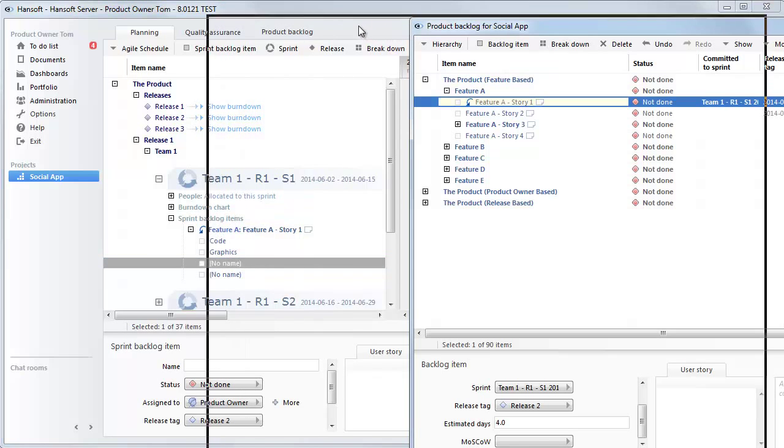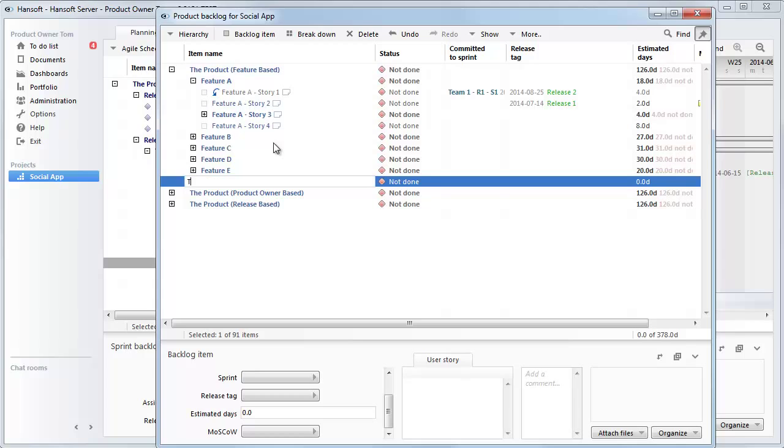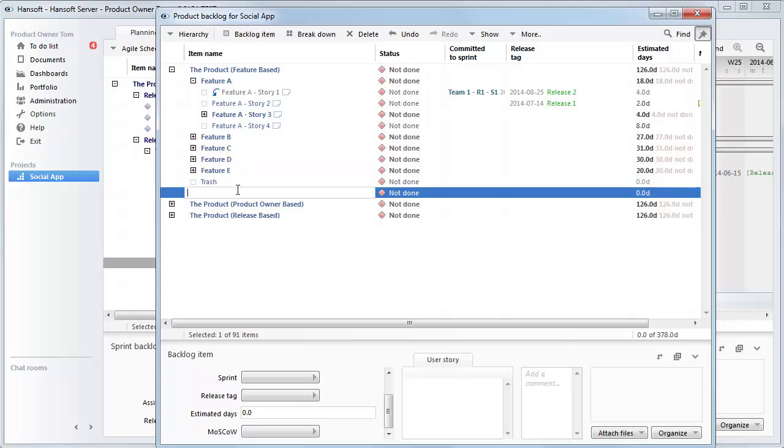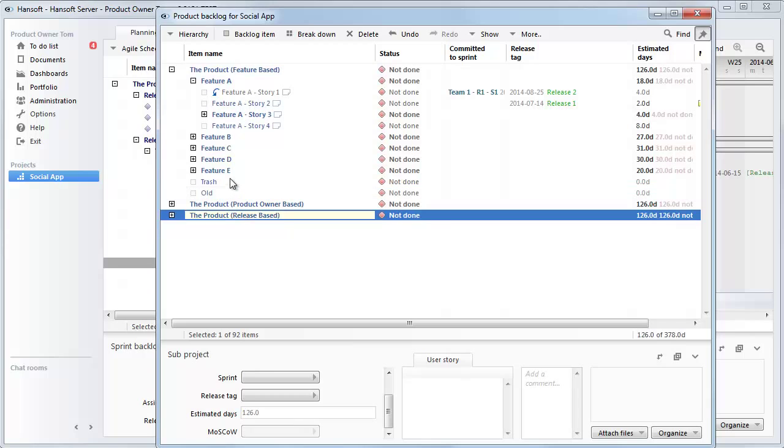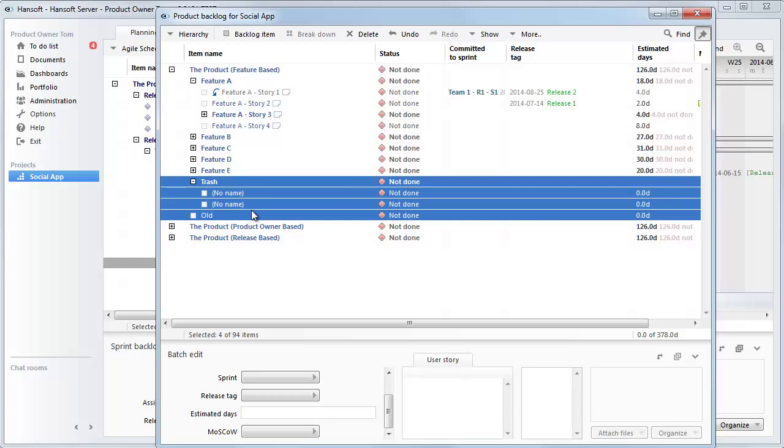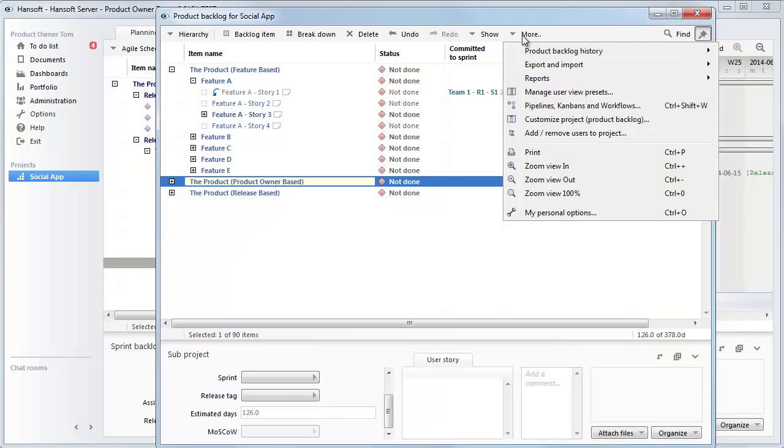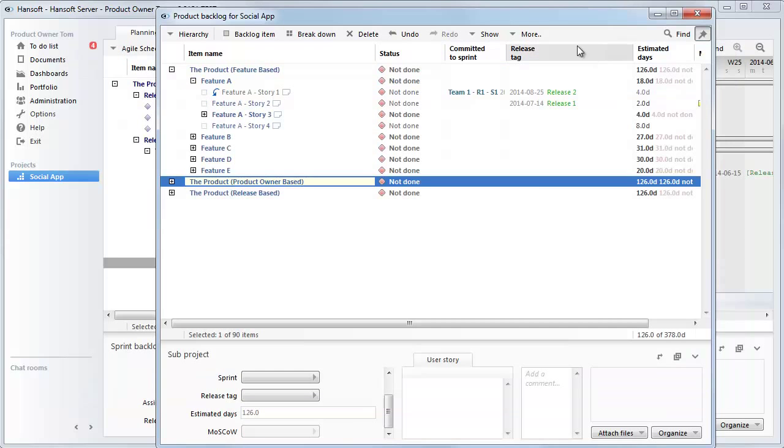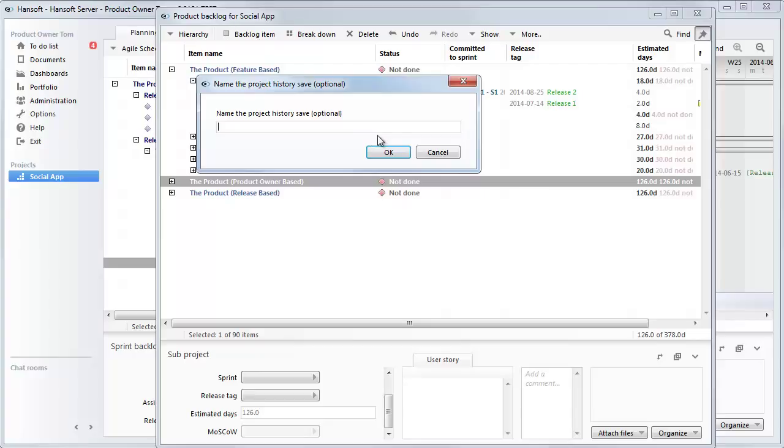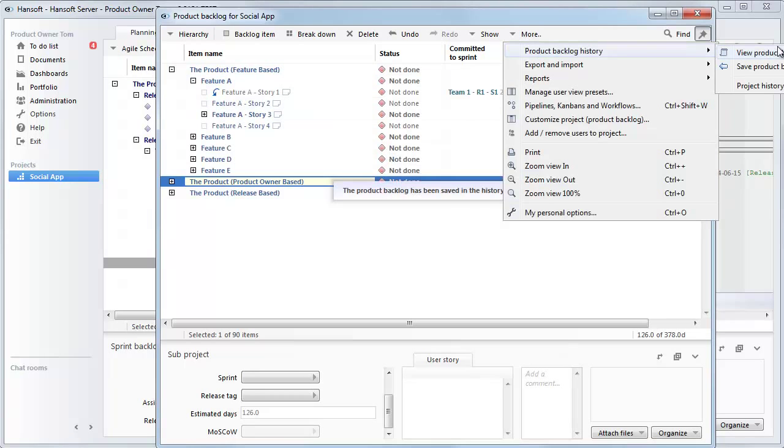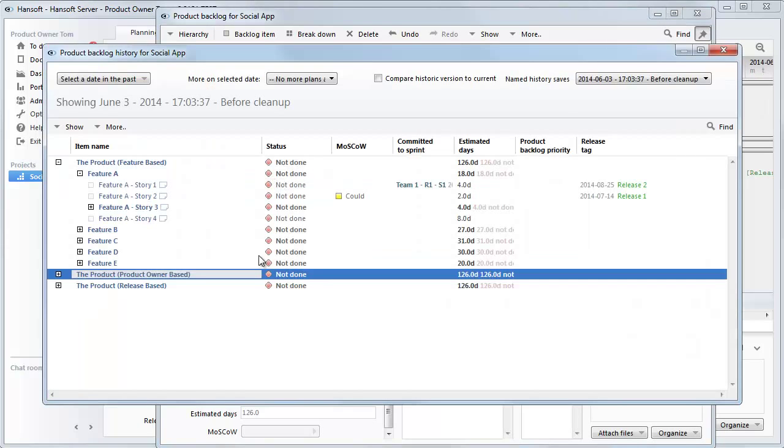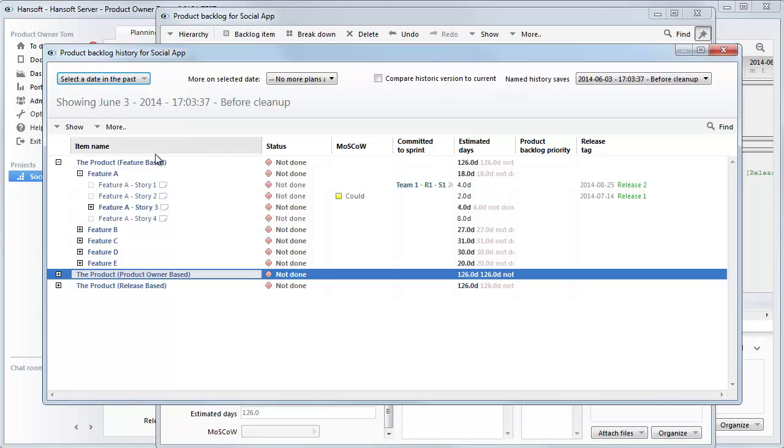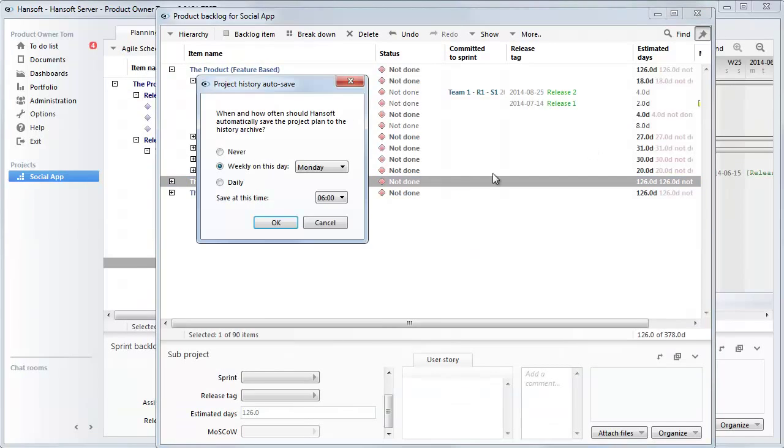Another aspect of keeping the backlog clean is to delete items continuously. It's quite common that I see buckets like this. Trash. Old. Or similar. Where you have a lot of items just lying around waiting to be deleted. Keep in mind that you have a backlog history. So if you go in here, it's View Product Backlog History. This project is new, so I have no dates from the past. But let's save one. And let's just save this as Before Cleanup. And now I can always access these to see what it looks like at a certain date. So you can select the dates, and you'll see the ones with the green triangle have the actual save. You can also choose to set this to save automatically, which is by default every Monday at 6 a.m.